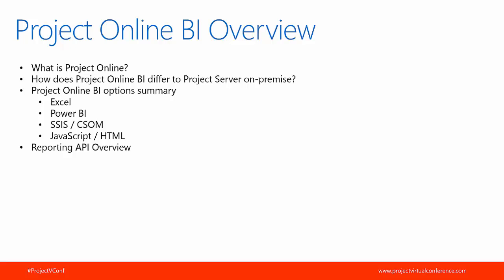database, for obvious reasons. So what Microsoft have done to get around that is introduced what's known as the OData reporting API. That's where all of the key reporting information is taken using the OData API, which is just a REST web service effectively. That is permission controlled within the permission model, so not all users will have access to that API. But that enables you to easily create reports in Excel or Power BI, or extract the information out using SSIS, or consume that API within JavaScript or any other technology that can consume an OData REST endpoint.